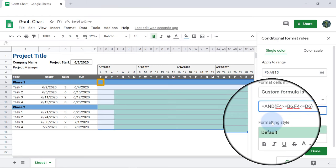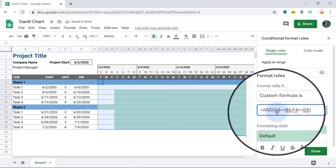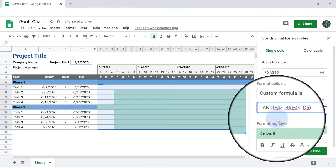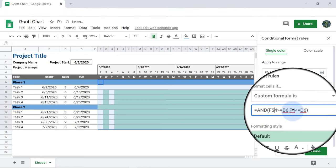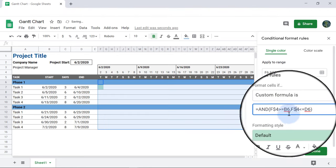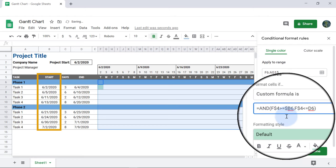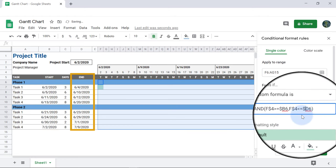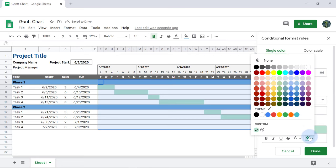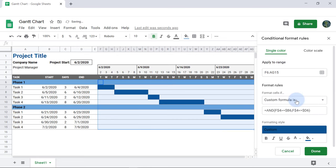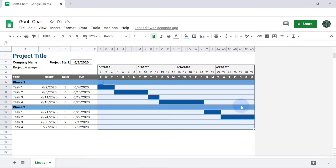Think of this formula as being copied to the rest of the cells in the applied range, so we need to make the rows of the date references fixed by adding a dollar sign in front of the row numbers. We'll also make the columns of the start and end dates fixed by adding dollar signs in front of the column letters. I want the color of the bars to match the design better, so I'll change them to a dark blue. Now we have a basic Gantt chart, but let's continue to add more features.